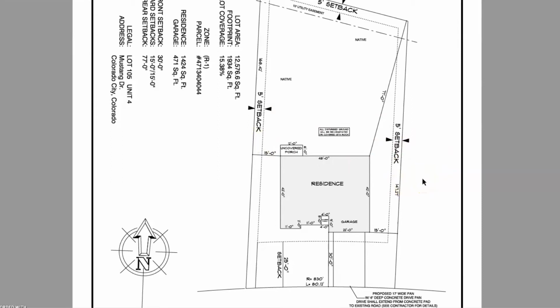So how in actuality do you measure this out and know that you're placing the foundation where it's supposed to go? Well, that's where the survey comes in. I'm watching this happen with an individual I know right now. They built a house that is actually over the line and touches onto the neighbor's lot. That is going to be a huge headache for them.